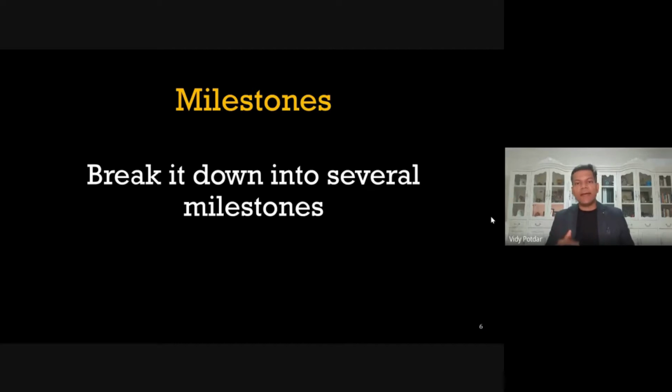So from the end date to where you are, make a list of steps, make a list of activities, or break it down into smaller pieces so that when you finish all these sub activities for that target, you will have your deliverable.